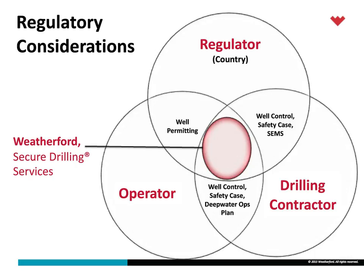Between the regulator and the drilling contractor, they want to know about well control, the safety case for the rig, the new SEMS requirements, training, and how installing new equipment with increased functionality impacts the drilling contractor — they'll need our assistance to stay in compliance. Between the operator and the drilling contractor in the Gulf of Mexico, they need the deepwater operations plan, which also requires talking about extensions of technology and best available safest technology. We're supplying systems that interface with all of these — it's different from supplying a liner hanger because we're supplying a service that enhances kick detection, potentially improves well control, and deals with well problems right in the middle between the regulator, operator, and drilling contractor.